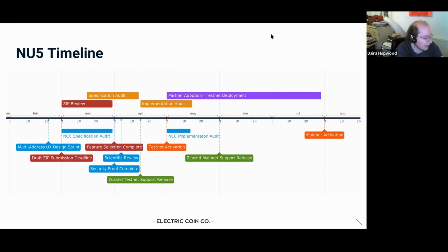Yeah, we should allow a slightly longer slip to remove a feature, because it's less likely that there will be another slip after that if the change is only to remove a feature.